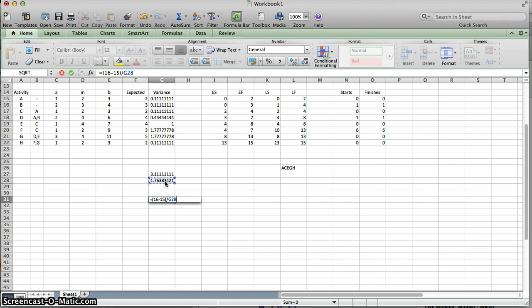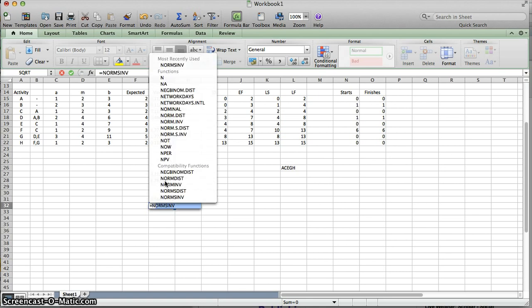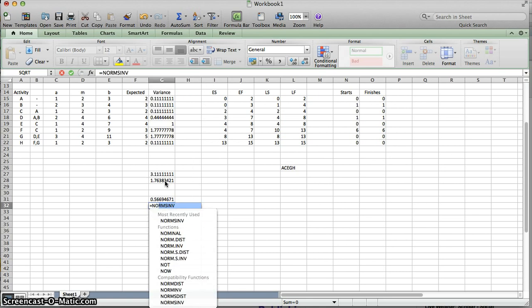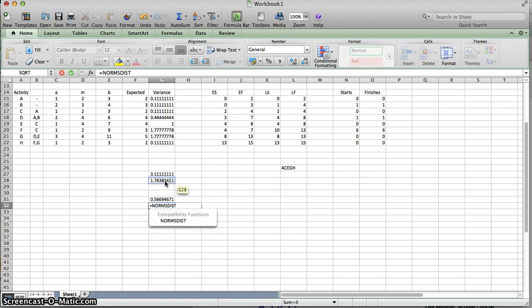So they're giving you 1 week more compared to what we consider to be a standard deviation. So 1 divided by 1.76. You then can look this up in the table on the back of your books in Appendix 1, or a nice thing about Excel is that it's already built in. The normal distribution is NORMSDIST, normal statistical distribution. And then we would just plug in this z value we had.